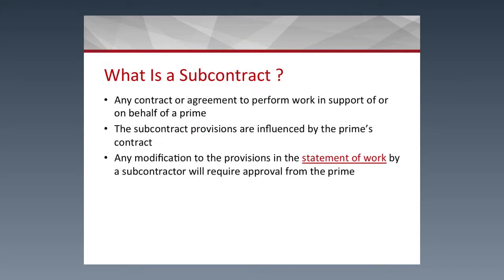A subcontract is an agreement to perform work on behalf of the prime. The subcontract provisions are influenced by the prime's contract. In this case, the two parties write out a statement of work, which outlines the procedures and methods the subcontractor will employ in accordance with the goals of the proposed project and in line with the prime recipient's contract.